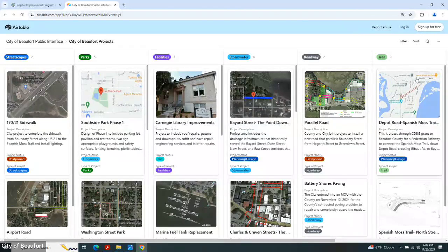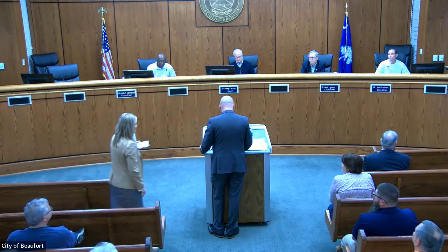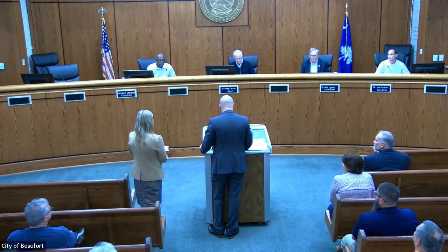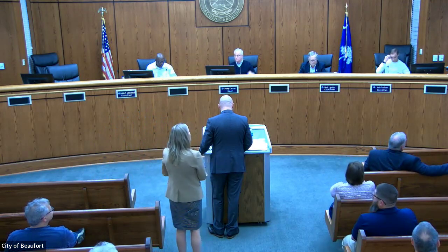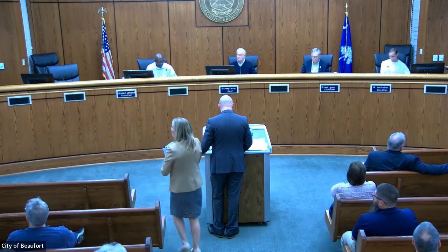Any questions about the Downtown Point stormwater projects? Anyone? No. All right. I'm going to turn it over to Julie Meyer with Cunningham Recreation. I pronounced your last name correctly, didn't I? Oh, no, did I pronounce it wrong? Meyer, Julie Meyer with Cunningham Recreation. They are on the Omni contracting services, so we do not have to go out to bid. All that process has been done at the state level. Julie has worked with our staff in the past, and she's been great working with Nate on these proposals. I'm going to pull those up and let her go over the proposal.